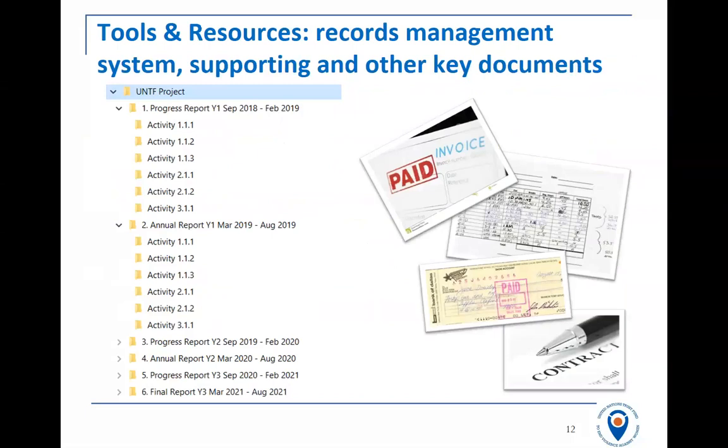Going back to records management, as I said, you must keep accurate and up-to-date records and documents of all expenses incurred with the funds made available by the Trust Fund. These documents will be regularly verified by us to ensure the validity of transactions. We mentioned it, I think, in section 1, but we will do a 100% verification check of all your invoices, payments, and records at your first 6 months progress report. We will check all payments. Therefore, it's good to start this filing system now.